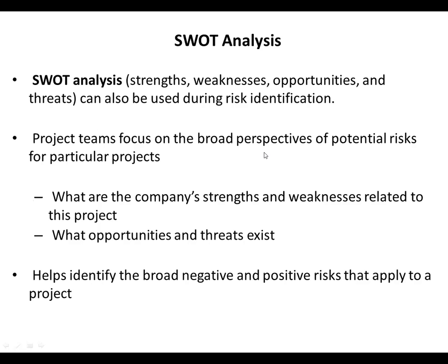In SWOT analysis, we try to identify four things in a project: strengths, weaknesses, opportunities, and threats. In risk identification, we can assume that positive risks are identified by strengths and opportunities, while negative risks can be identified by the weaknesses and threats.